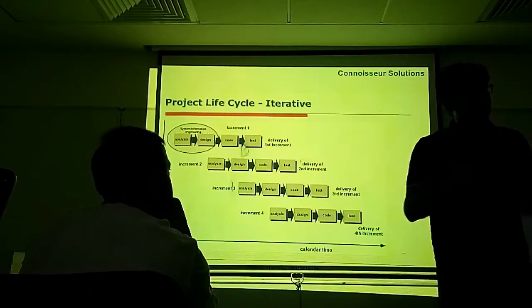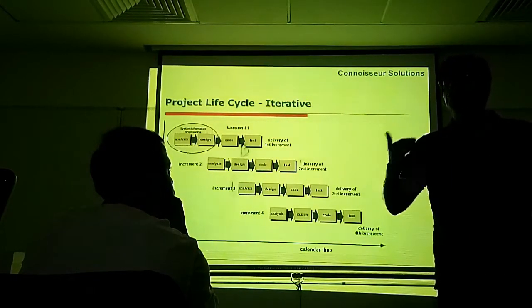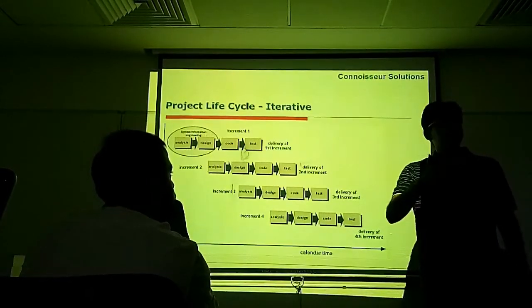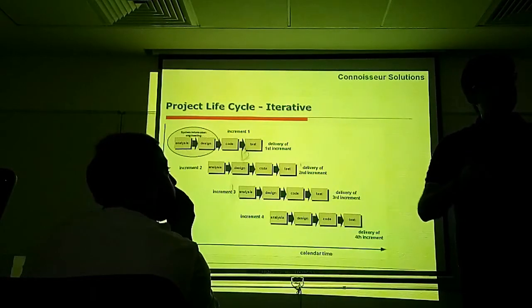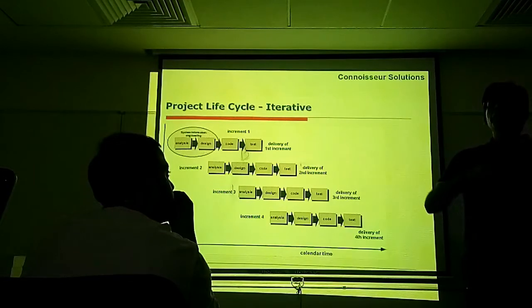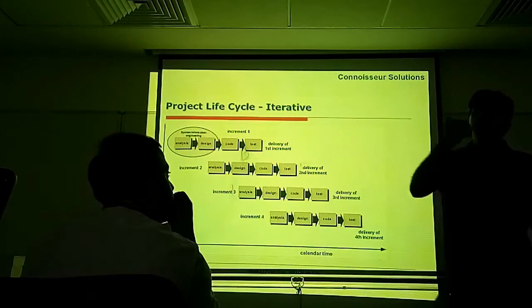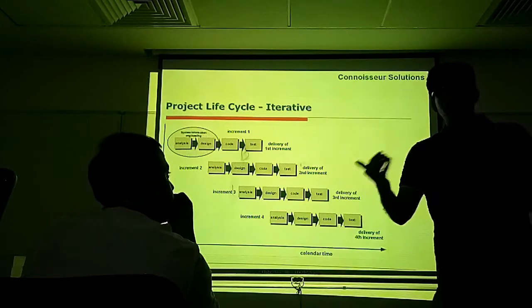Now the key benefit of delivering a project in phases is, first of all, at the end of every phase, you can review and retrospect. You can review the performance of the project against the major variables. You can do retrospection. Based on the learning from retrospection, you can take corrective and preventive action for the subsequent phase.